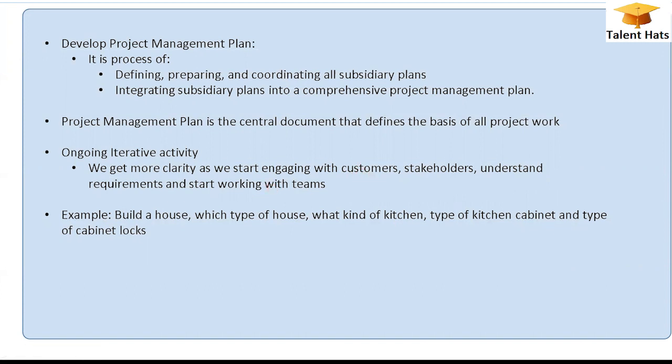Team, can you tell me how much time you will take to create this requirement? So the team will give some estimates, right? My schedule will be created as per that estimate. Once the schedule is created, I will come to know what the cost is. So all this is iterative. As and when we get more clarity, when we start engaging with more and more people, we will be creating more and more plans related to this project management plan, right?